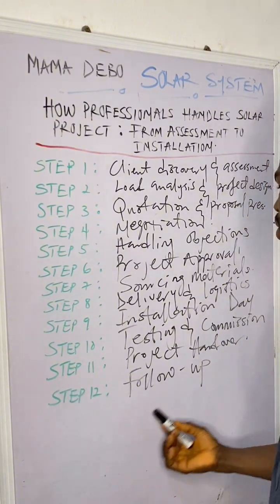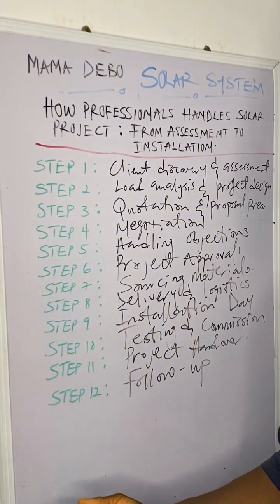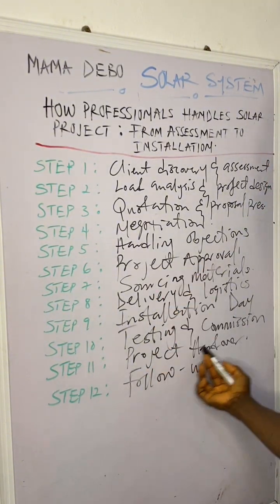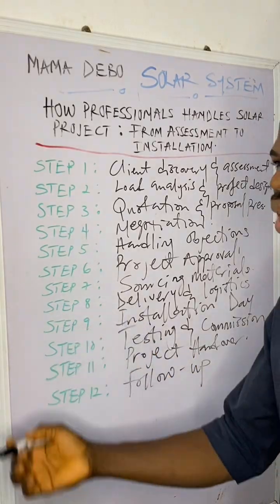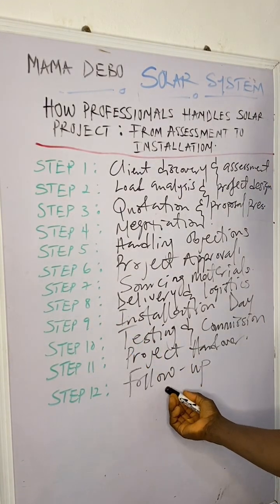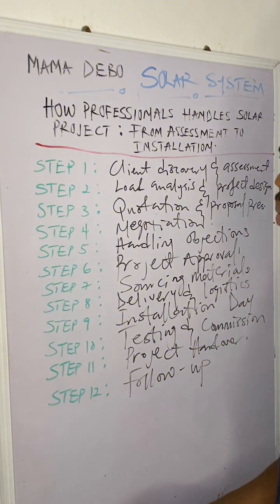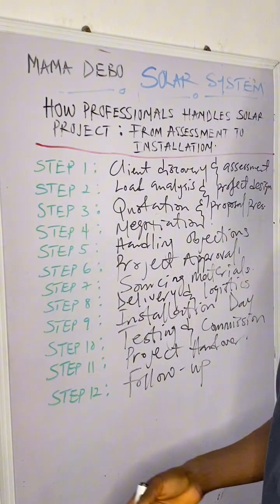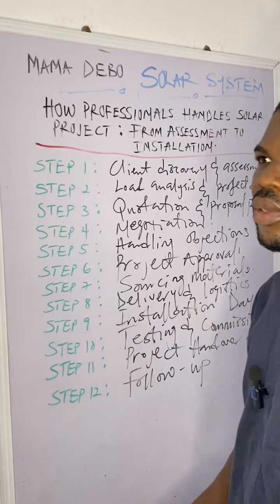Then after that, your project handover. If everything has been successful, then you hand over your project. Once you hand over, your client will sign. After that, you follow up with them maybe 2 weeks after or 3 weeks after. These are the steps to follow.